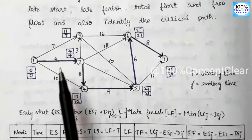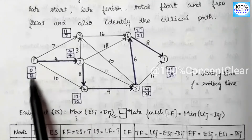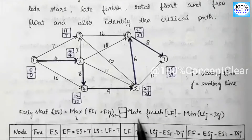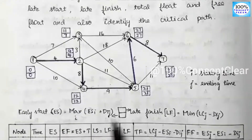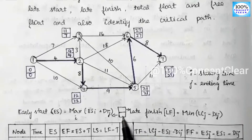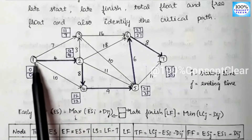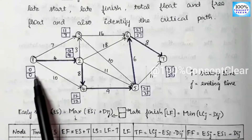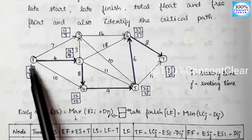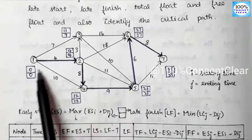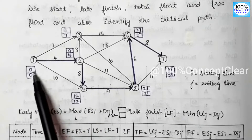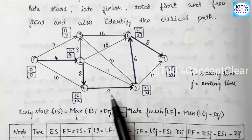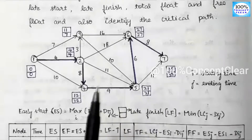For slack time, the formula is Late Finish minus Early Start. For critical activities, the small and large values in the box are equal, so slack equals 0. On the critical path, Early Start and Late Finish are equal — this is the key condition for identifying critical activities.